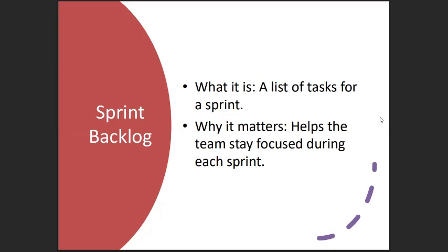In a typical Agile project, this is the first thing you need before you start doing the job. So you need to have a list of the tasks that should go into the sprint. So by the time you have the list and you pick those tasks into the sprint, a typical sprint is a 2 weeks time period that allows for implementation to go on for 2 weeks, deploying or working on those set of tasks identified for that particular sprint.